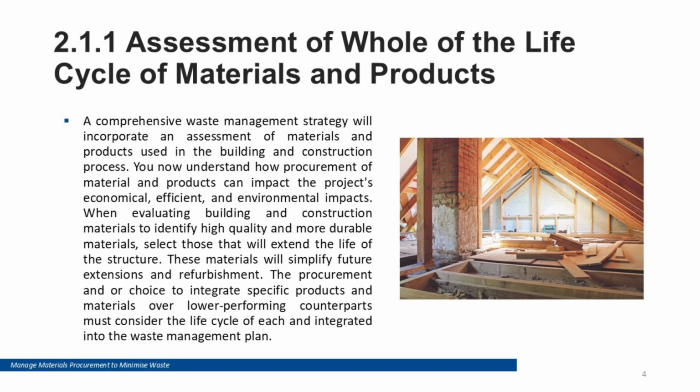Life cycle thinking considers impacts from extraction and manufacture through transport, installation, use, and end of life. It helps compare options beyond upfront price. A material with higher initial cost may last longer, reduce maintenance, and be easier to reuse or recycle. In procurement planning, document key life cycle factors: durability, repairability, recycled content, supplier certifications, and end-of-life pathways, so choices are evidence-based.